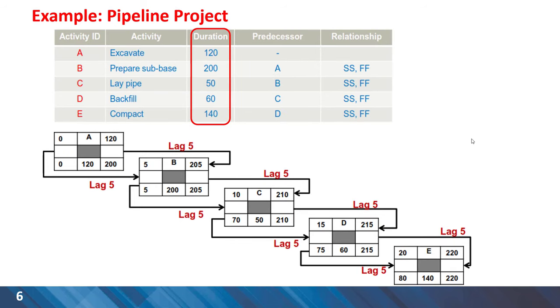As you can see now activity blocks are populated with early start and early finish time and in the backward pass late finish and late start times. Everything seems alright but have a closer look on activity C. We can see that the duration of this activity is the minimum, only 50 days of duration.